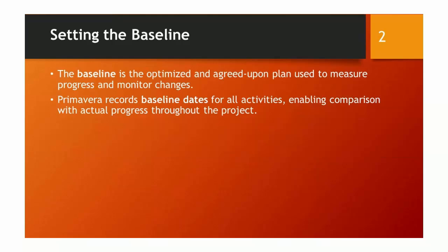The baseline is the optimized and agreed-upon plan used to measure progress and monitor changes. Primavera records baseline dates for all activities, enabling comparison with actual progress throughout the project.